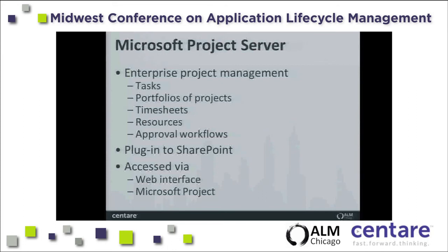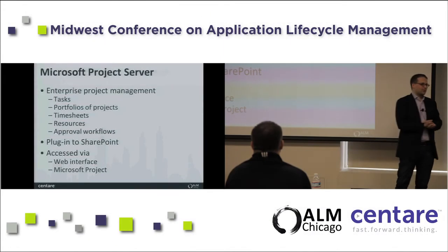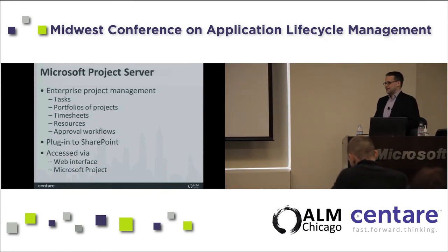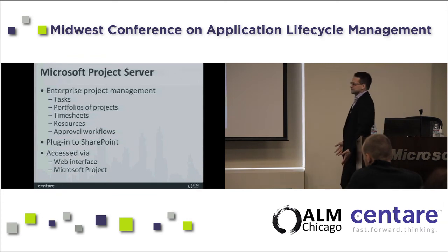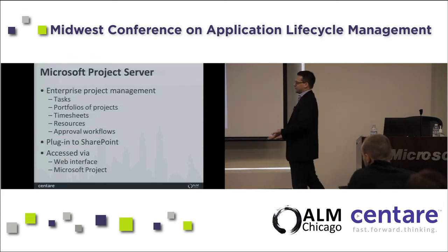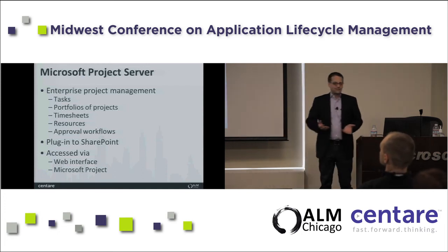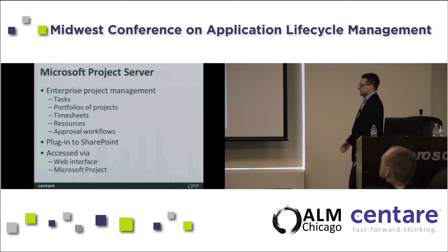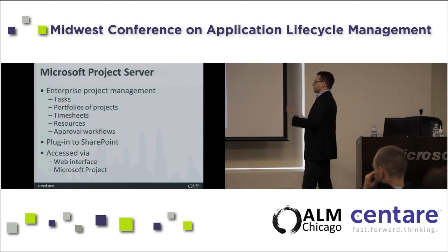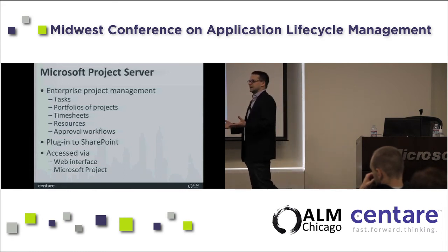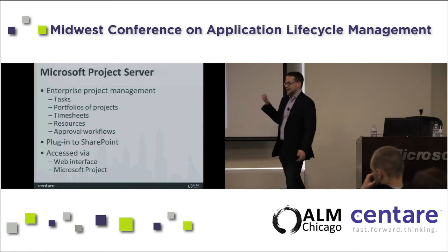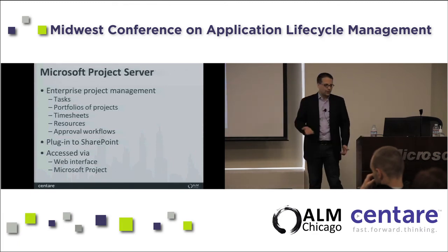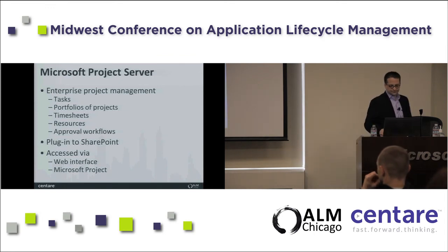So another part of this is Microsoft Project Server. Microsoft Project Server integrates, as you might guess, into Microsoft Project, and it's an enterprise project management solution. Where TFS is very Agile-centric, Project Server is all about doing that waterfall stuff and doing it really well. So managing portfolios of projects, doing demand management, doing workflows for approval, all kinds of fun stuff like that. If you're in that waterfall zone, that's the tool for you. It's a plug-in to SharePoint, and you can access it through a web interface or through Microsoft Project itself.